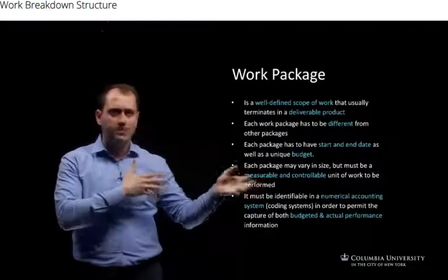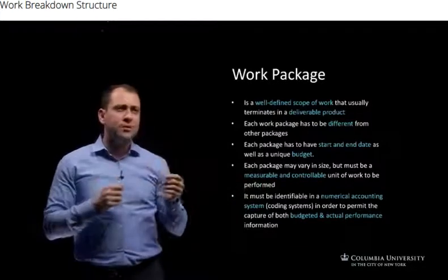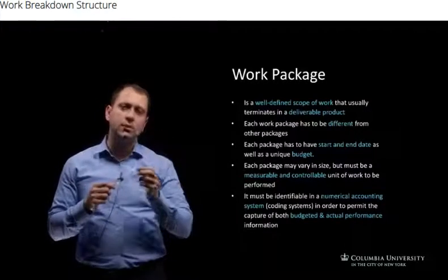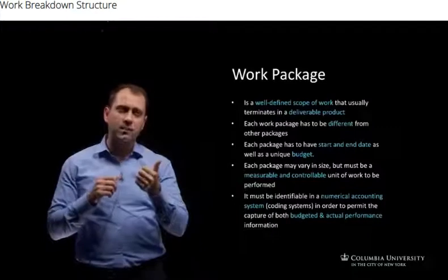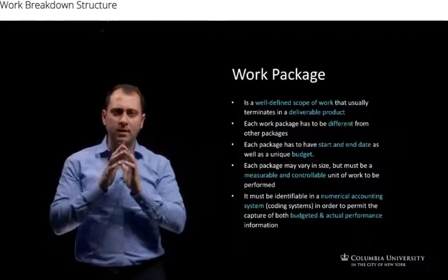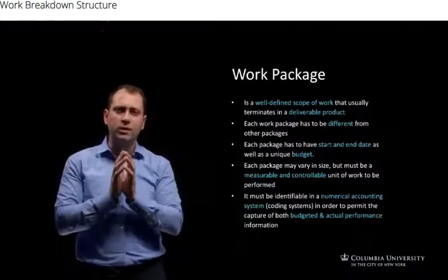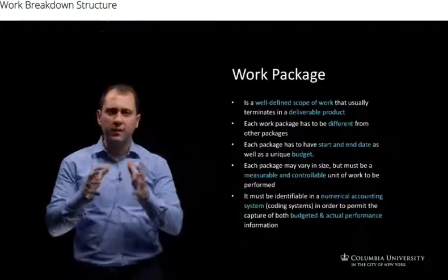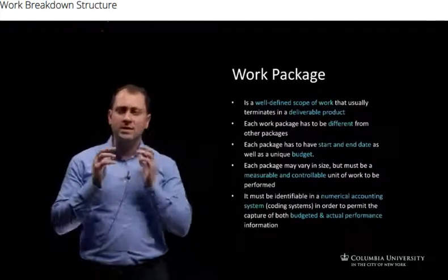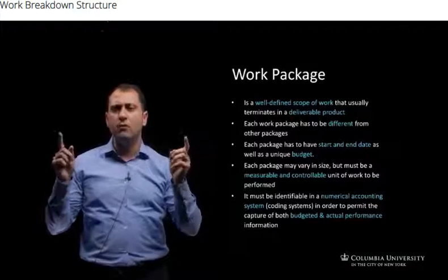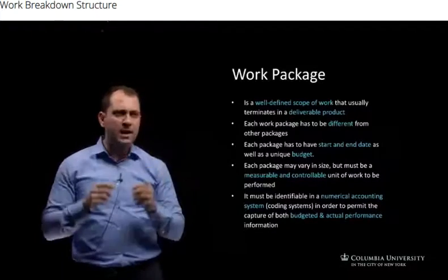Like in level 2, we divide the walls into 4 other components, like the north, east, west, and south walls. And each package also has to have 2 main characteristics, which are related to the time as well as the budget. How much money we are identifying or how much budget we are putting into that specific work package to deliver it, and what's the start and the end date, the time period to complete that work package and to deliver it.